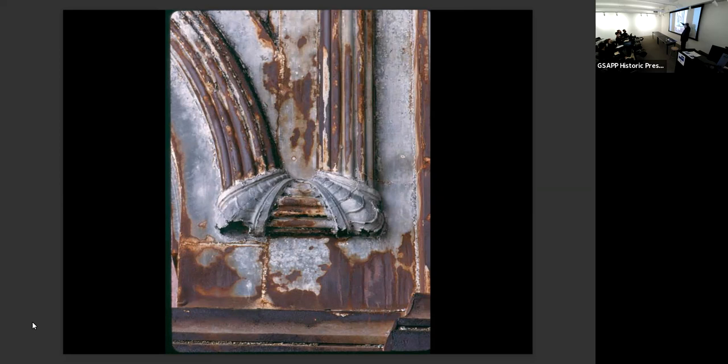The arches on the inside were done with galvanized steel sheet and stamped zinc. But these pieces here were run on an obscure piece of machinery called an English wheel that allows you to do molding and curving on any curvature. There's one in the United States. Replicating this came in at about $4.5 million. Fiberglass came in at $1.4 million, $1.2 million, something like that. And I basically had to just eat it, you know, just shut up. Okay, Piper, shut up. And that's what I did.